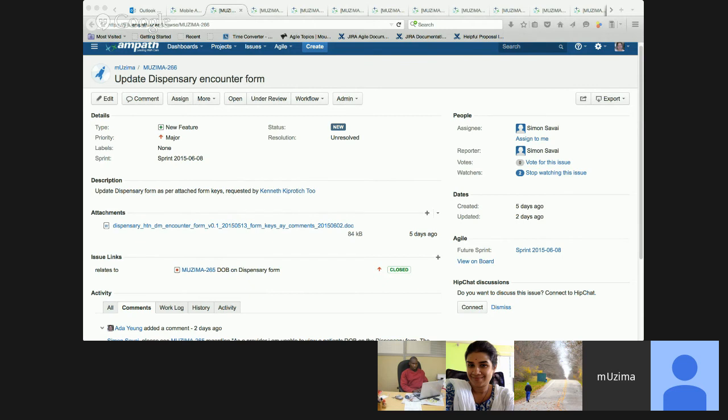If there are any new changes to the form after testing, and they pertain to the changes that the person is making, maybe yes. But if it's a completely different part of the form, or a different question, or a new validation, I think we should save it for the next set of tickets. Yeah, I agree. It just has fewer confusions.